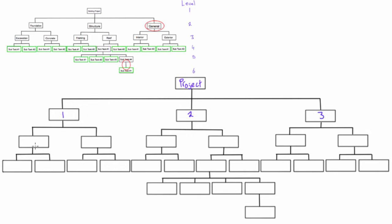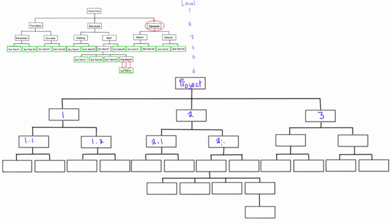On the third level - we had level one, two, three - this is our third level here. Now we just use two digits with a single decimal place. So this one here would be 1.1, this one would be 1.2. When we come down here, this would be 2.1 and this would be 2.2. This one would be 3.1 and 3.2. I think you might be seeing the pattern now.